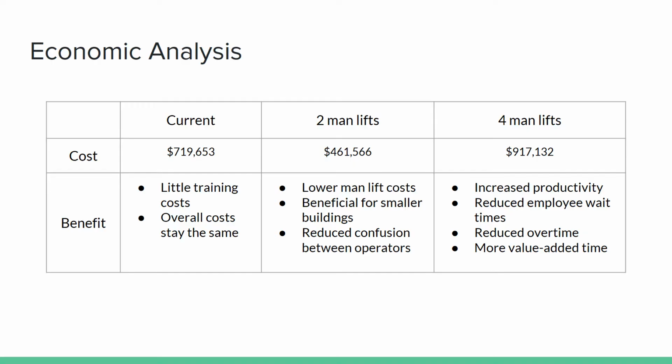So for results, we want to talk about the benefits to their current system. A benefit to it is that there is little training required, since the employees are already trained to the current situation, and the only thing they would have to learn is the SOPs that we want to present them. At the same time, all costs will also be the same. If we take 1 man lift away, we lower the overall costs of the man lifts by about $250,000.